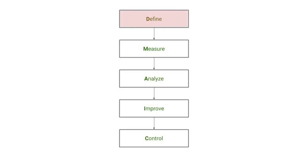When considering how you can improve customer experiences using DMAIC: first, define the business problem, goals, resources, project scope, and project timeline. Next, measure — conduct performance metrics and data collection to establish baselines and measure success. Then analyze — find the root causes of problems and understand their impact. Next, improve — implement a reasonable solution to the problem. Lastly, control — implement the changes and stay on top of monitoring the updated processes you've established.